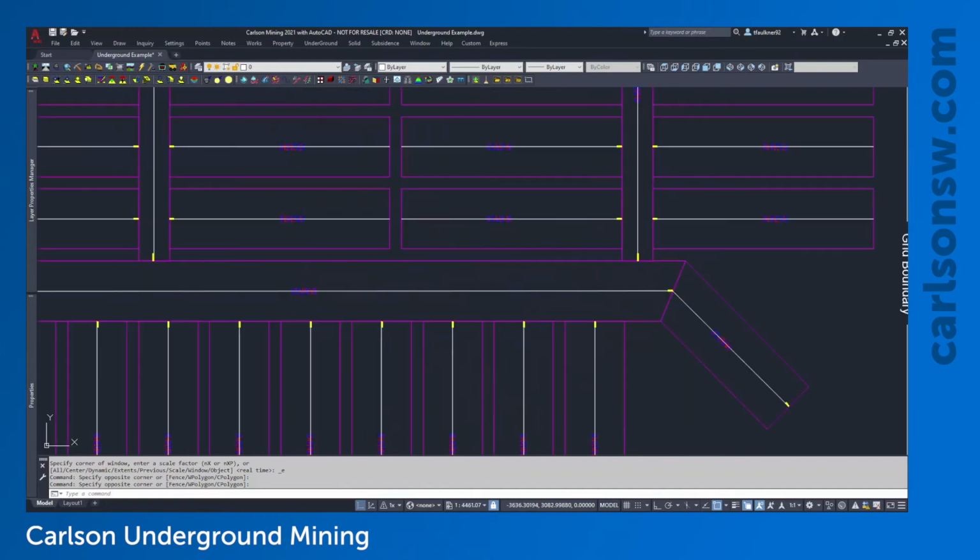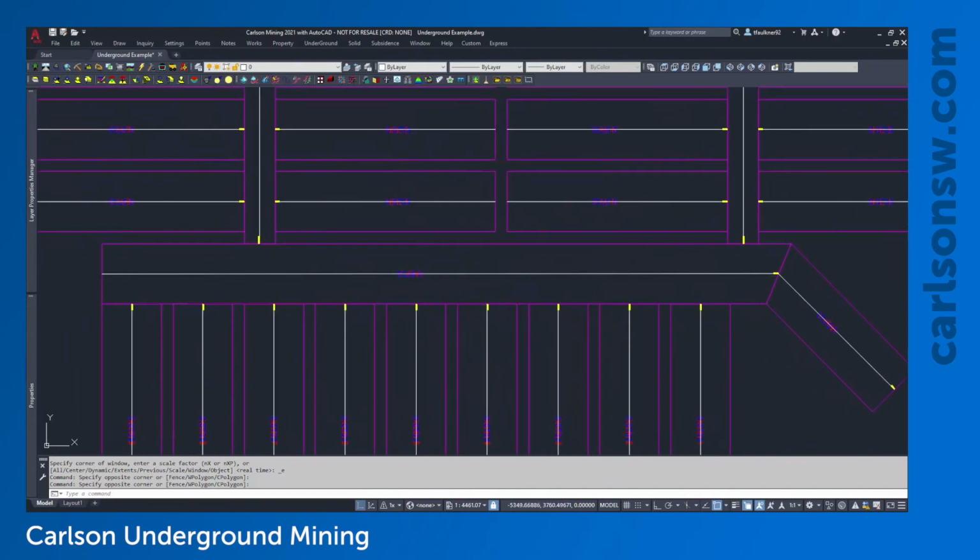So for example, if I look at this main panel running from east to west, if I have a continuous miner working on this panel, but I don't want it to actually mine the entirety of the main, then back up, branch off, and get something else, I would need to subdivide the main panel so that I could basically mine up to this point, tell the miner to deviate off this panel, and go down to this production panel.